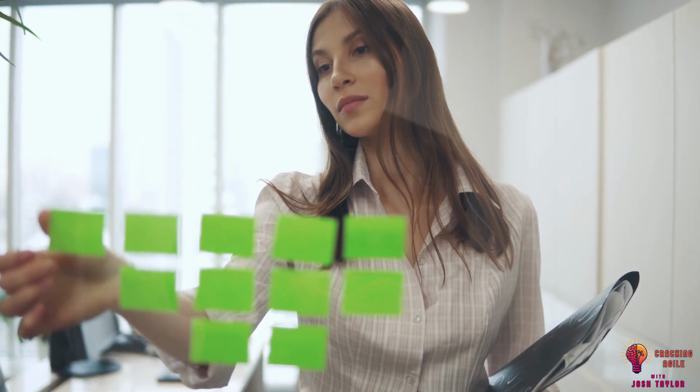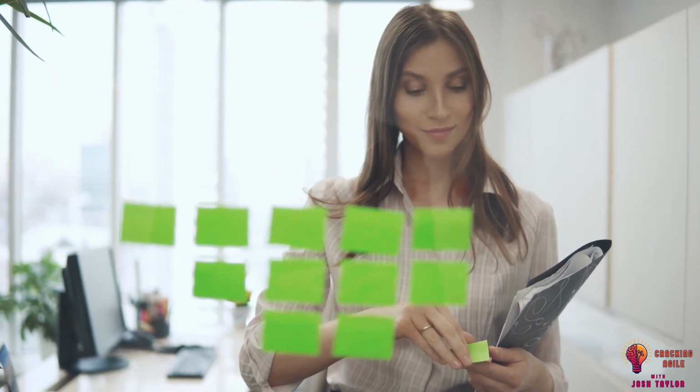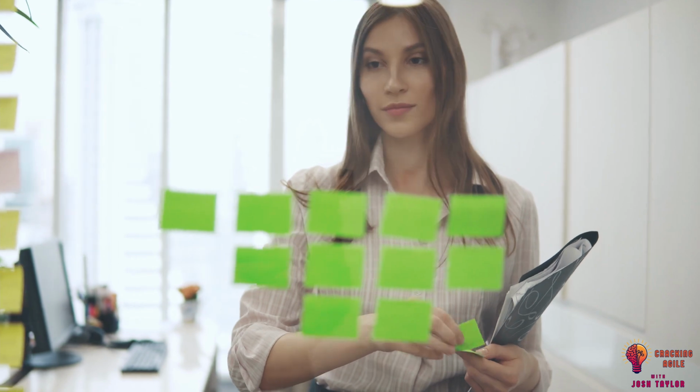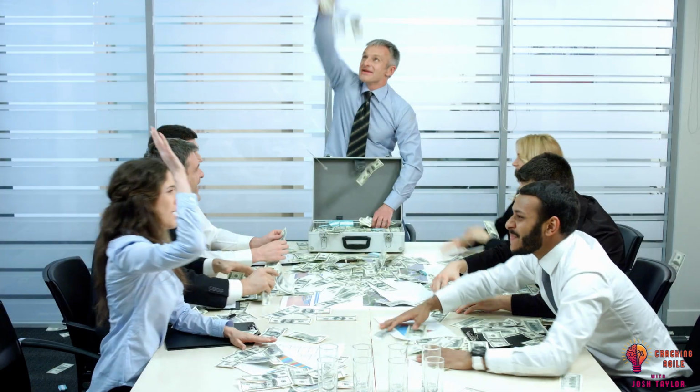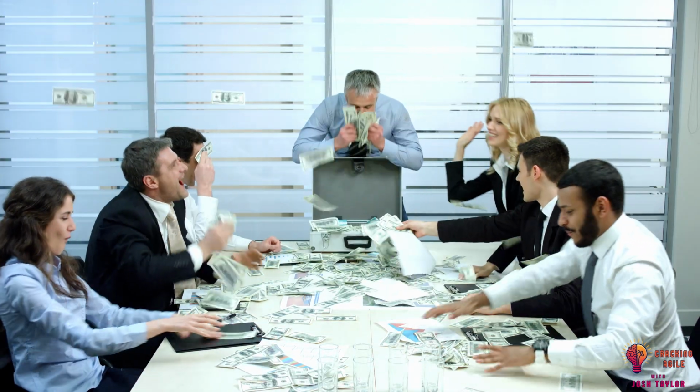Remember, if you're only able to access a particular resource at a certain time, then your schedule needs to reflect it. That likely will impact your activity sequence, as the material is a blocker for the work that needs to be completed. It's important to call out that some of these procedures may already exist within your organization, since this overlaps with procurement and other departments. When in doubt, ask your project sponsor.